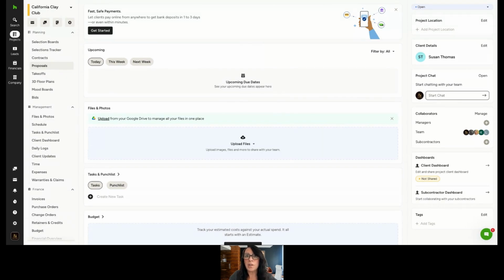You want to make sure you have a retainer and that retainer is paid for your hours in case anything happens with the project. You don't want to spend 10, 15, 20 hours for the client to back out and not get paid. But you can obviously use a retainer for anything that you like. You can use it for product, whatever you want to use it for.